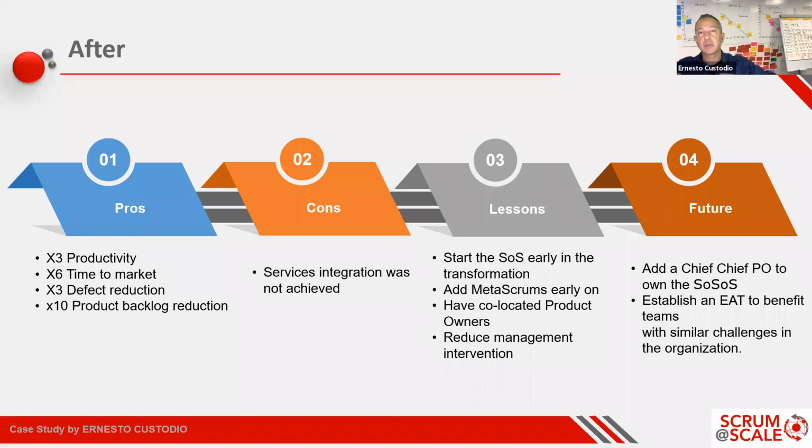And the product owner at the bottom is able to take those larger epics and convert them into a term that we're more familiar with, let's say user stories, that can be executed within a single sprint. So it is a single backlog. How you tag that has different permutations in different organizations. If you're using something like Jira, you might use some tagging. If you're using a physical board, you might simply use different color schemes. That all depends, as long as you're able to trace that into a single source of truth.